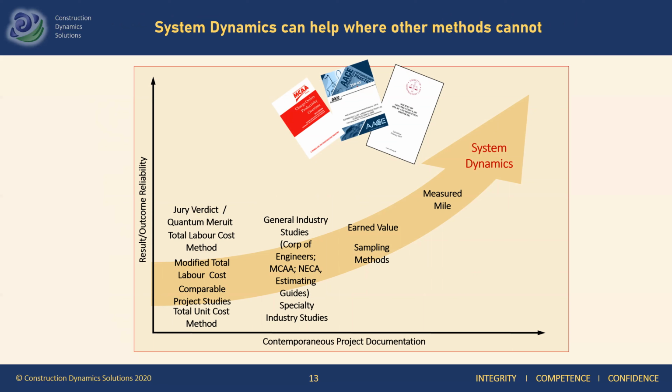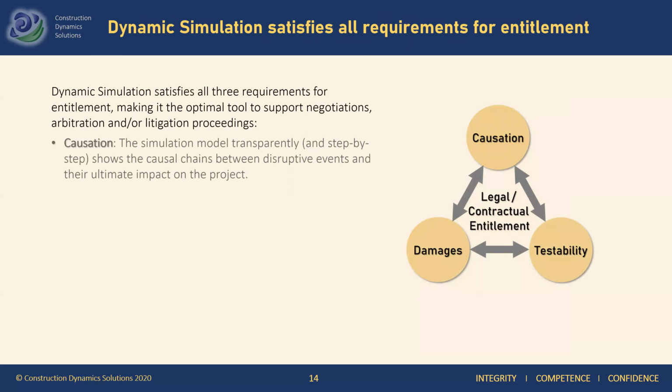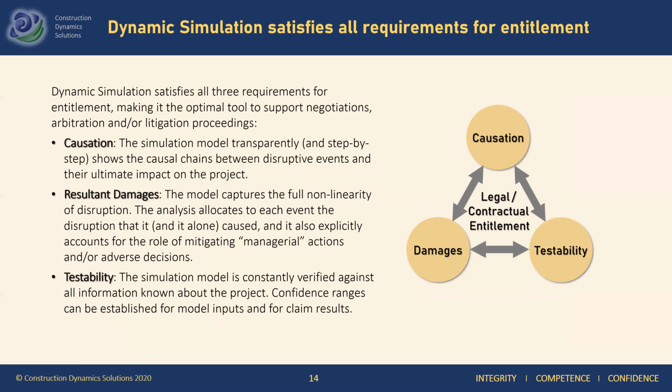And here's why we say that system dynamics can help where other methods cannot. All assessment methods for disruption need to satisfy three requirements to be defensible. First, they need to establish causation. And system dynamics models do that because they are based on causation.